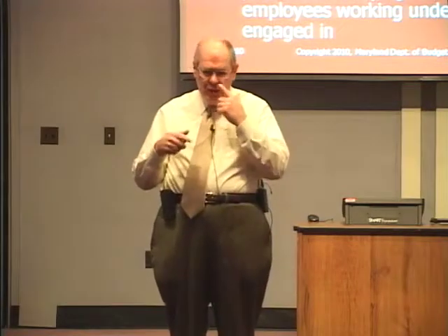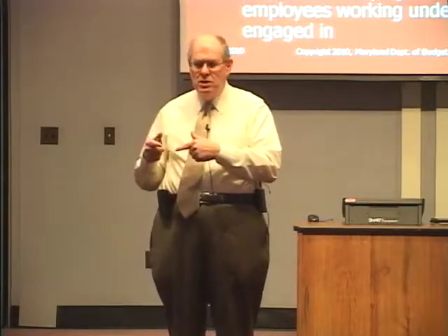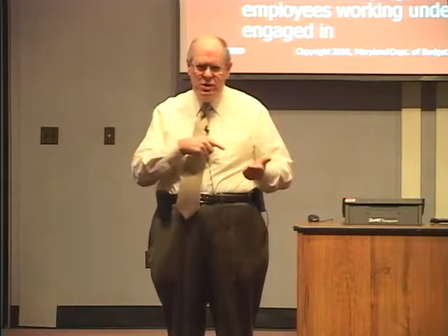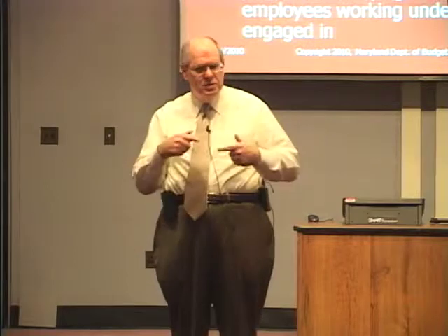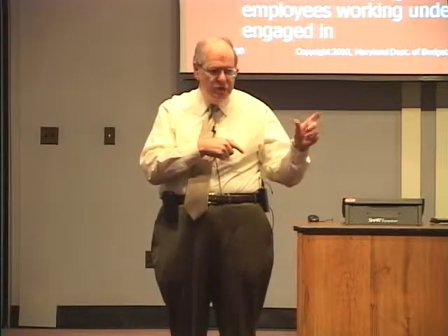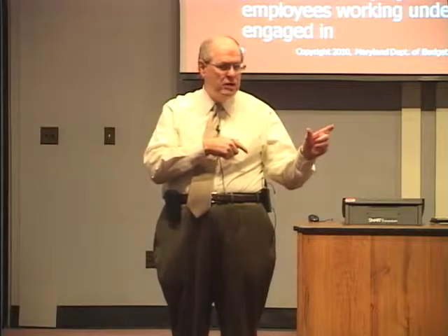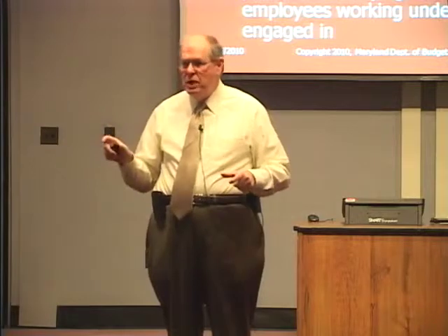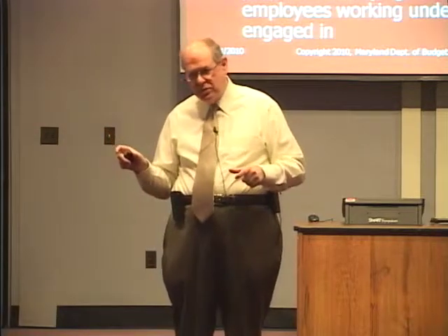And then I move on, and I start with mental hygiene, and it's like, wait a minute, didn't I just see that person listed under the DDA, Developmental Disabilities contract? So I go back and open it up and say, yes, that person was going to work 40 hours under the contract that this vendor has for developmental disabilities. And now the person is also working 40 hours under the contract for mental hygiene administration.